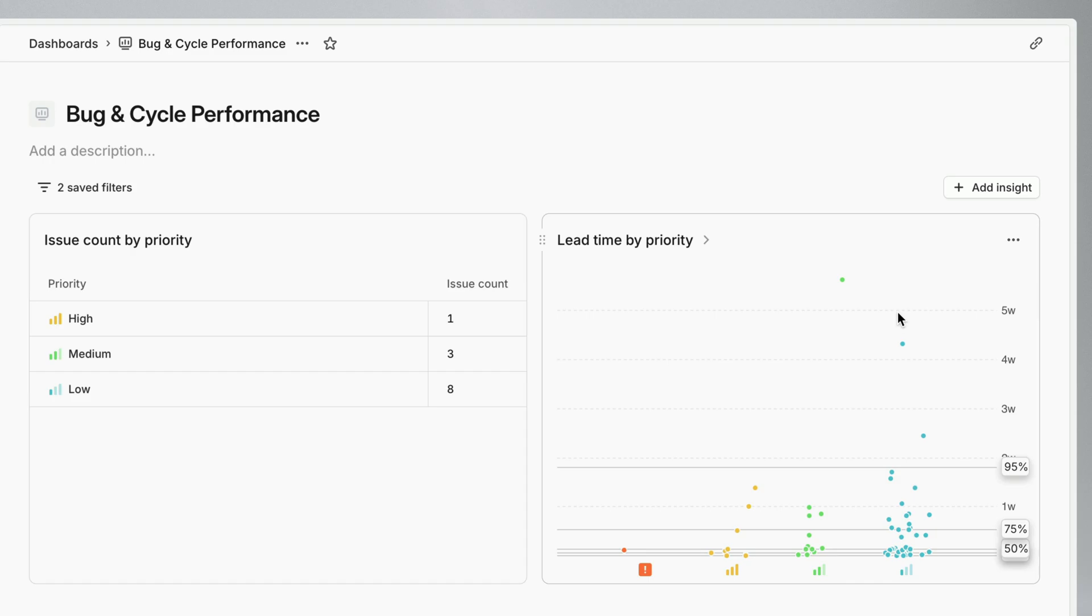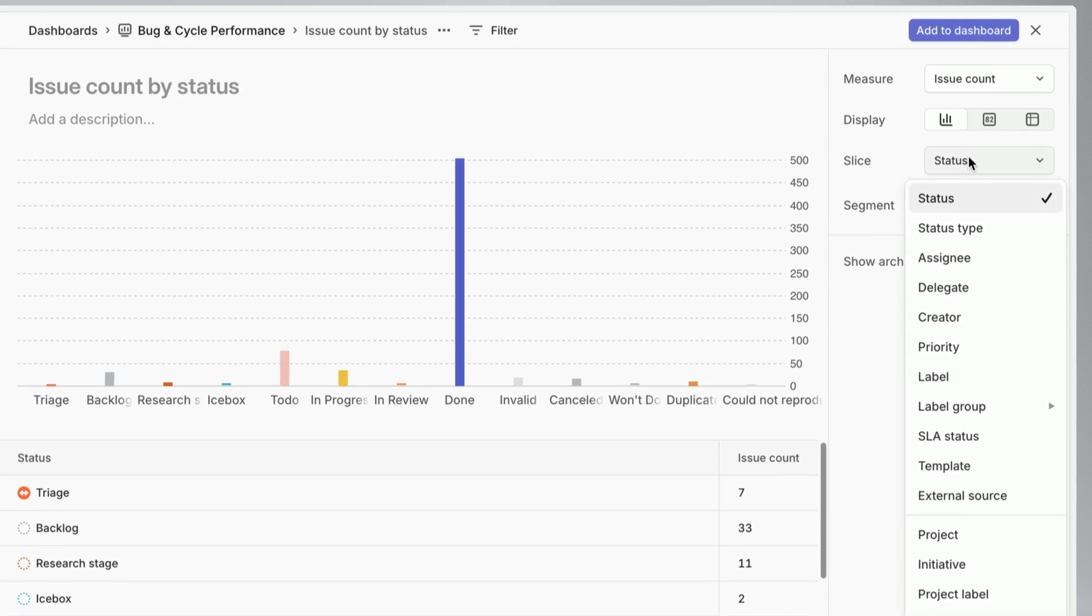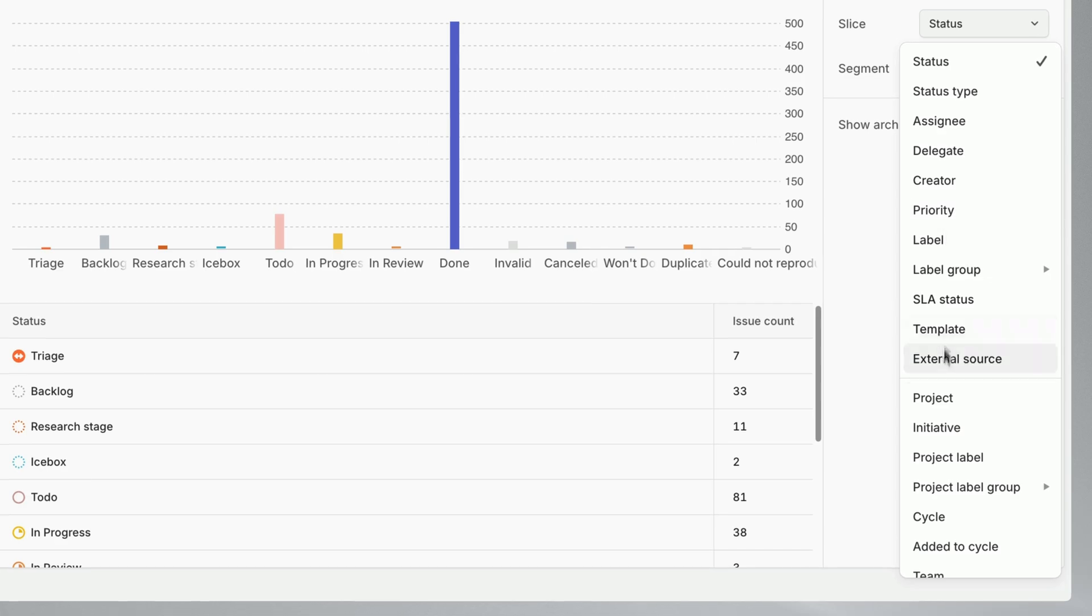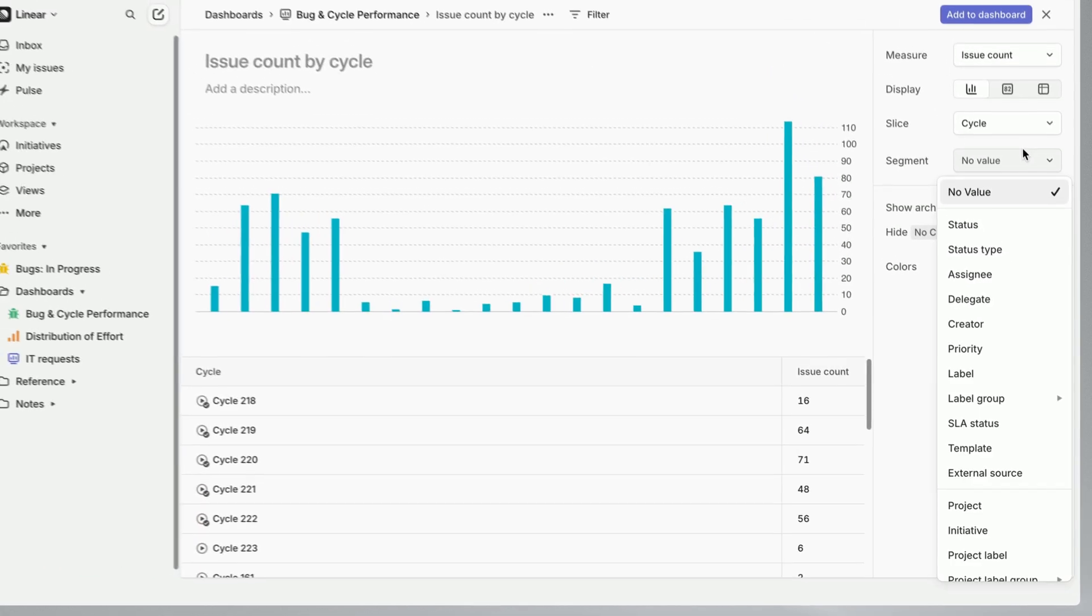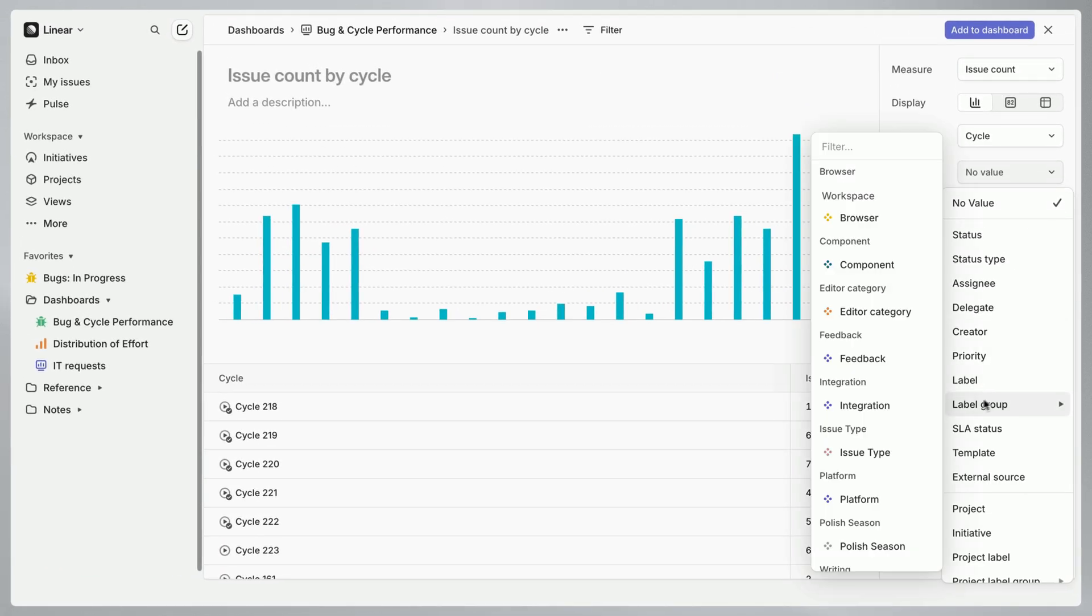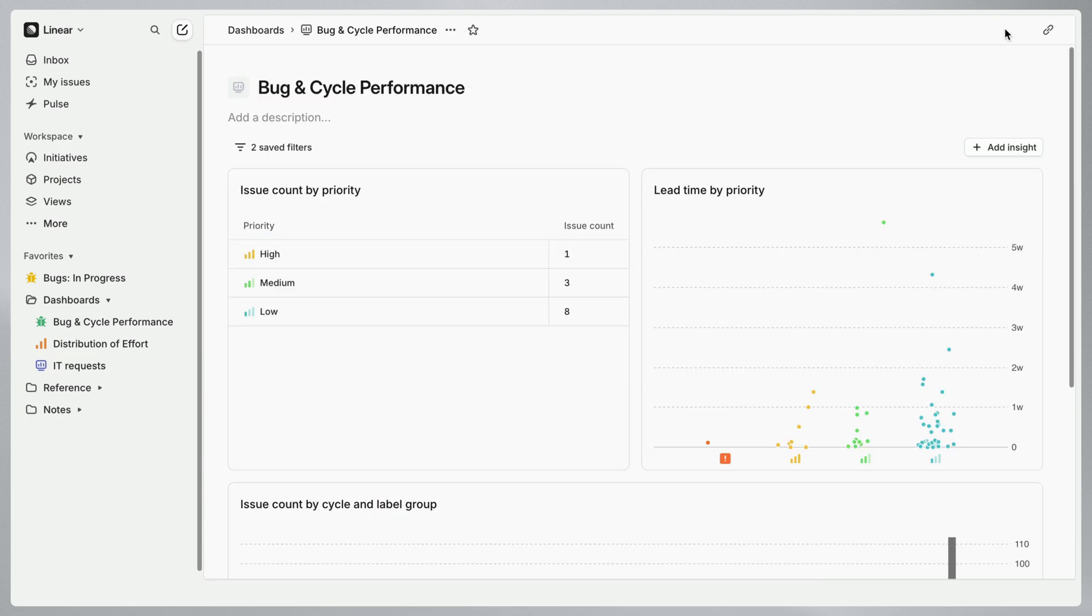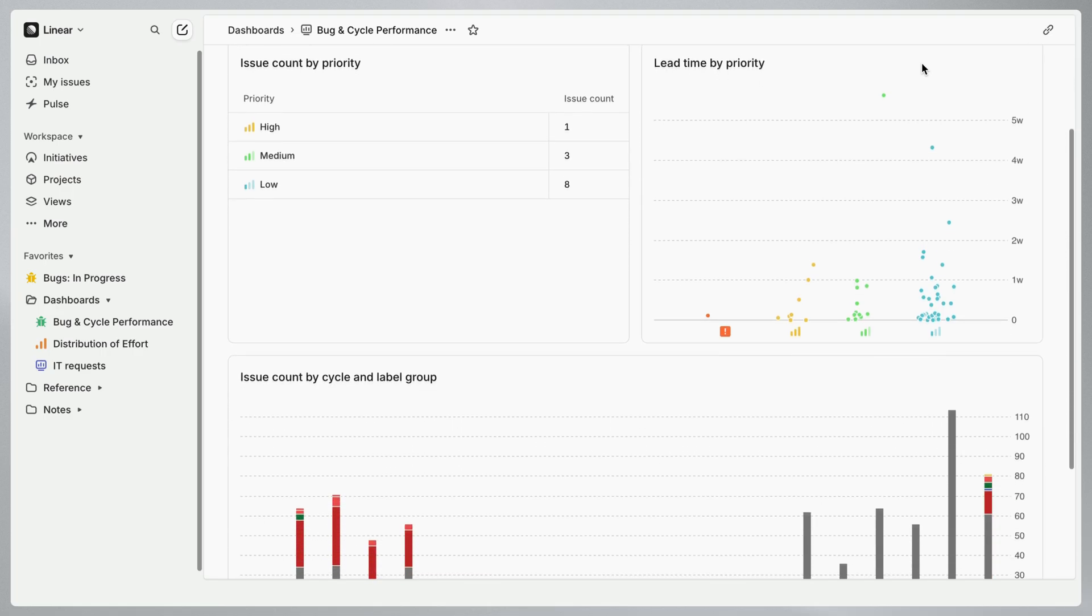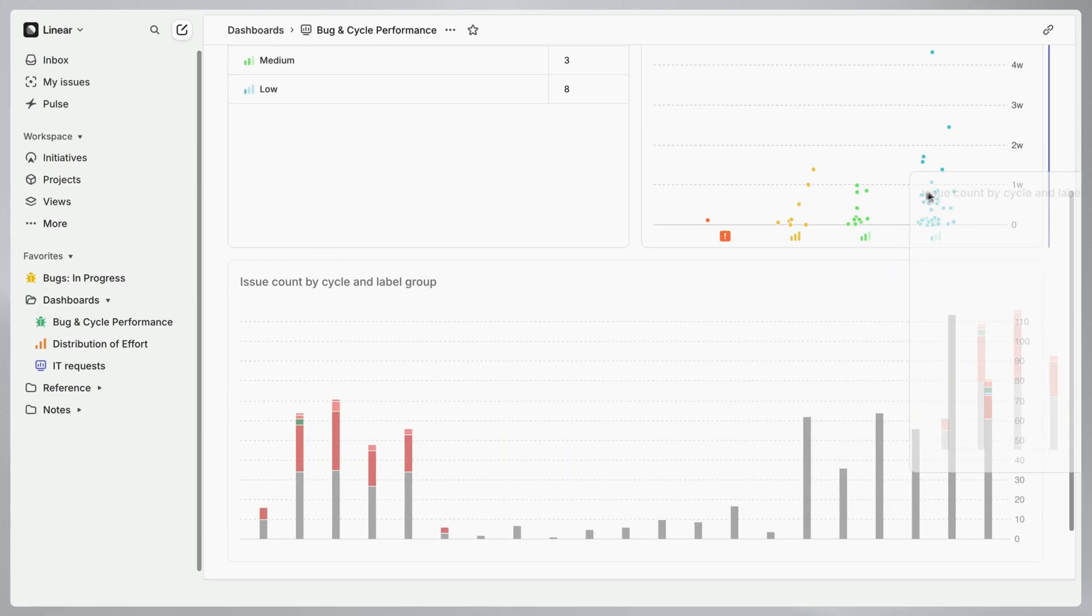Another insight to consider adding is issue volume over time. Here we'll measure how many issues we work on during each cycle and then segment those by issue type. This helps map where the team's effort is going and flag unexpected spikes in bug reports that may point to a specific feature or product area that needs dedicated improvements.